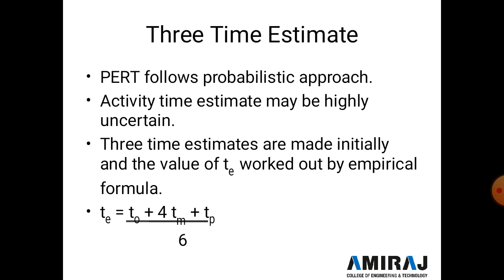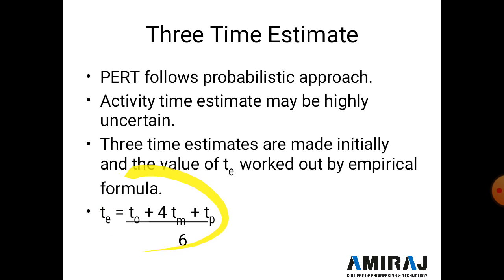In a PERT diagram, three times are given: to (optimistic time), tp (pessimistic time), and tm (most likely time). The estimated time te is calculated from these three values using the formula. We will discuss to, tm, and tp in detail in the next slides.